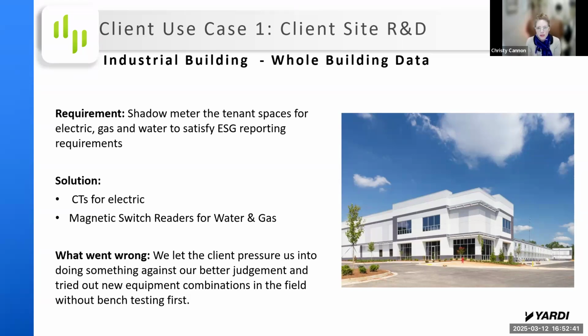And for ESG reports like GRESB, if you're familiar with those, you can only estimate 20% of your consumption. The rest of it has to be metered data. So you have this window where you've got to start early in that calendar year collecting actual meter information in order to meet those thresholds for your ESG reports. And so we were up against a wall where the legal stuff took forever, the speccing took forever, the site assessments took longer than they were supposed to.